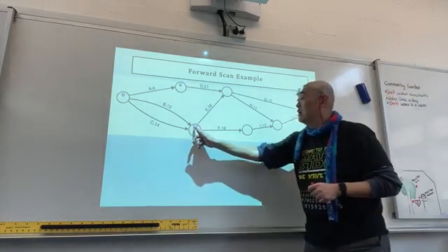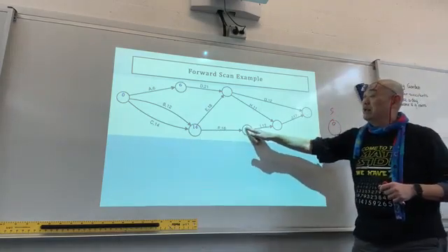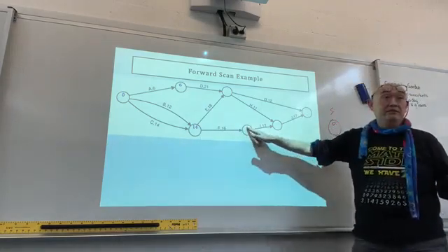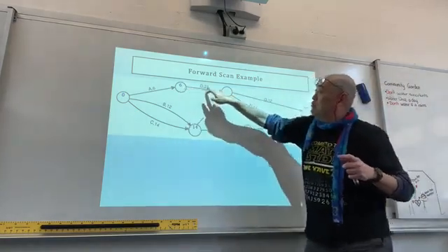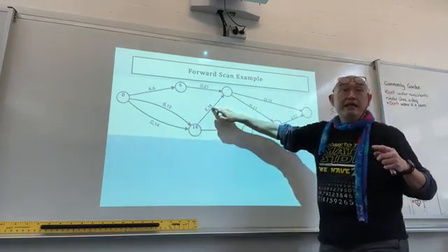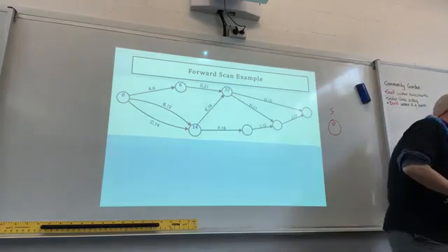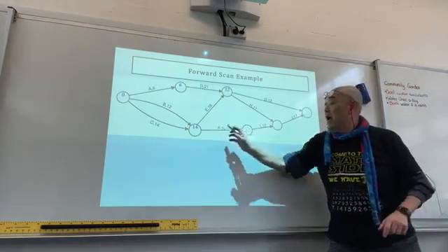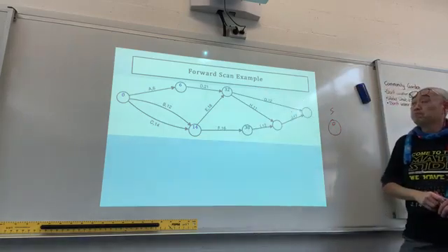Now here, 14 to 16, there's only 1. You can write down 14 plus 16, that's 30 straight away. Whereas here, you have to think about it. 6 plus 21 is 27, whereas 14 plus 18 will give you 32. So 32 over here and 30 over there.